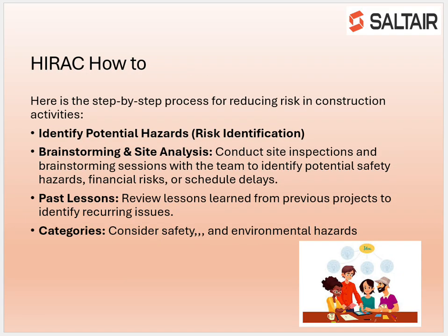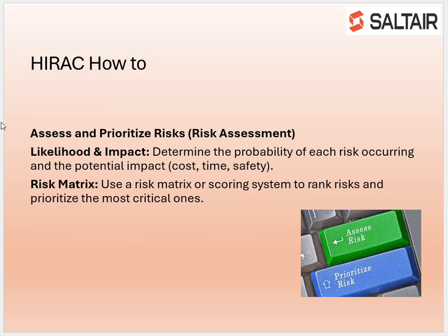In practice, identifying hazards involves a combination of site inspections, team discussions, and reviewing previous project data. It is important to consider not only safety risks, but also environmental and operational factors that could impact the project. Risk assessment in practice involves determining both the likelihood and potential impact of each hazard. This allows teams to prioritise risks and focus resources on the most critical issues.